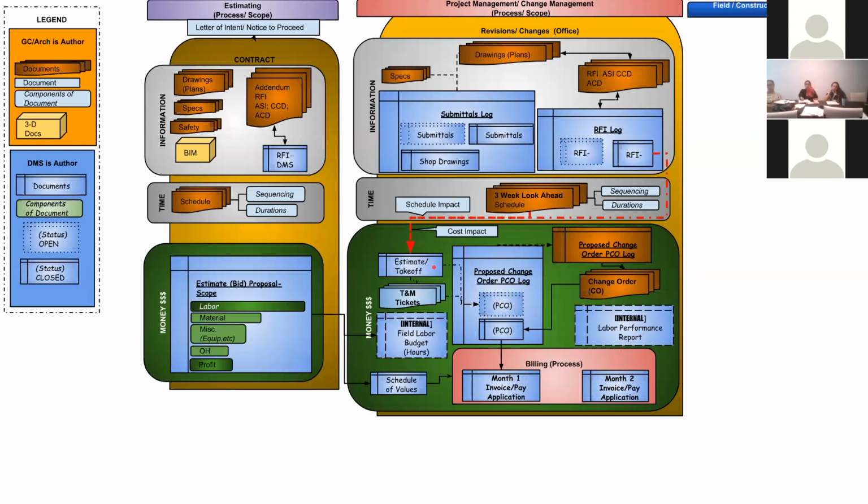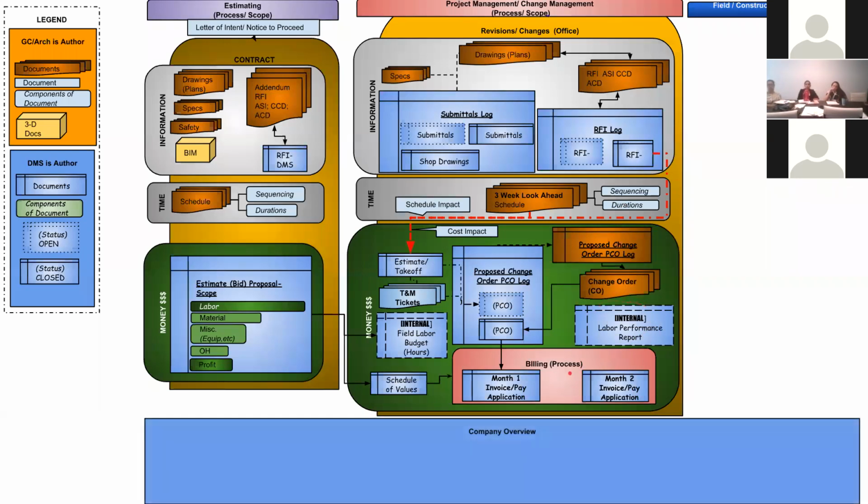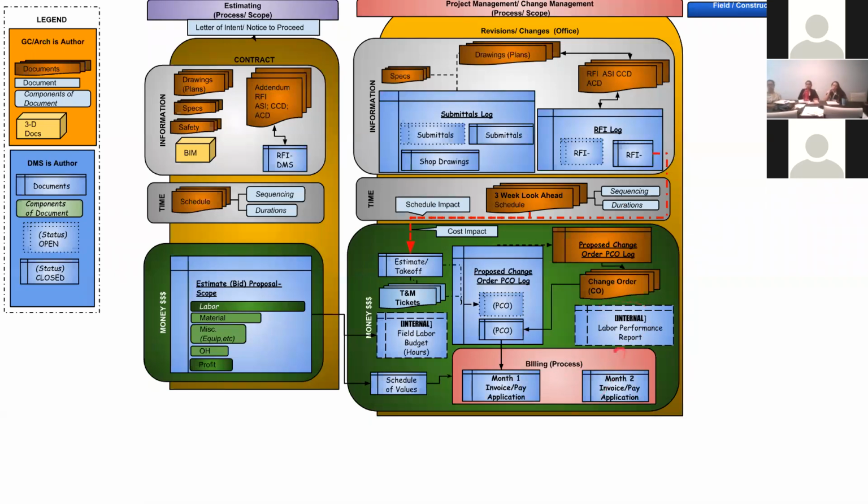If everybody can hear what she's saying, just because we're not spending money on it, the advantage is that if we collect the money or if we get the amount approved, it will go onto a change order here. And if it goes onto the change order, that change order can go onto the billing. That means that we don't necessarily have to put a percentage against it, but the value has been approved.